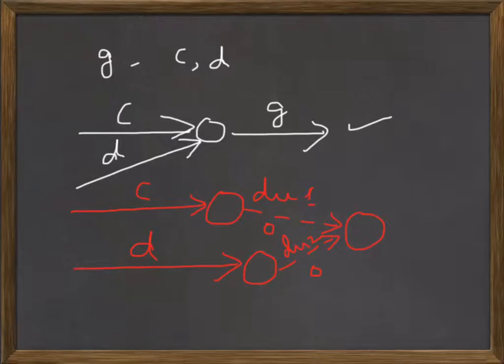Now if I put some numbers like 1, 2, 3 on these nodes, say we are starting G from node 3. At node 3, two activities are ending, both are dummy. This dummy starts from node 1, which indicates the end of C. Same way this dummy 2 starts from node 2, which indicates the end of D.